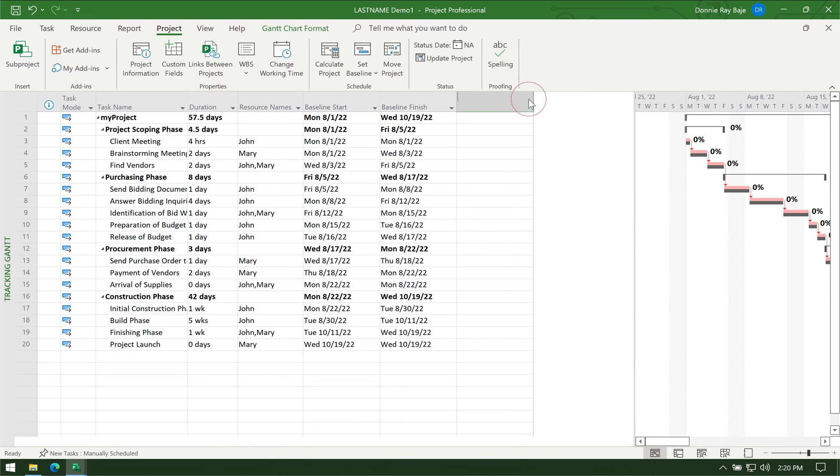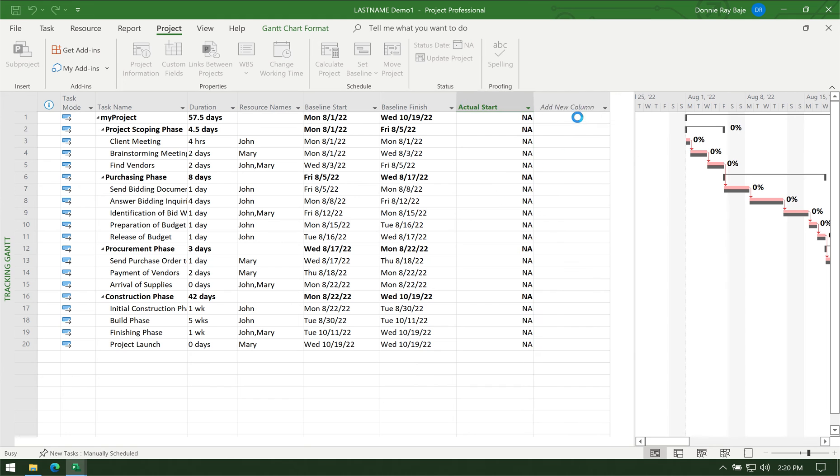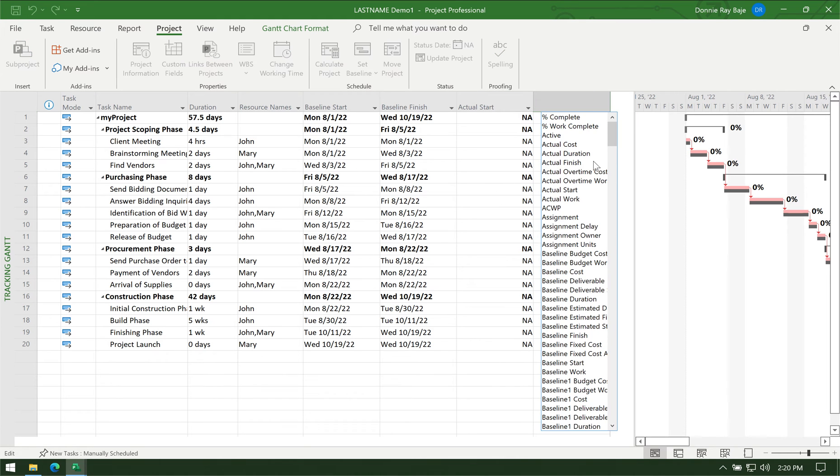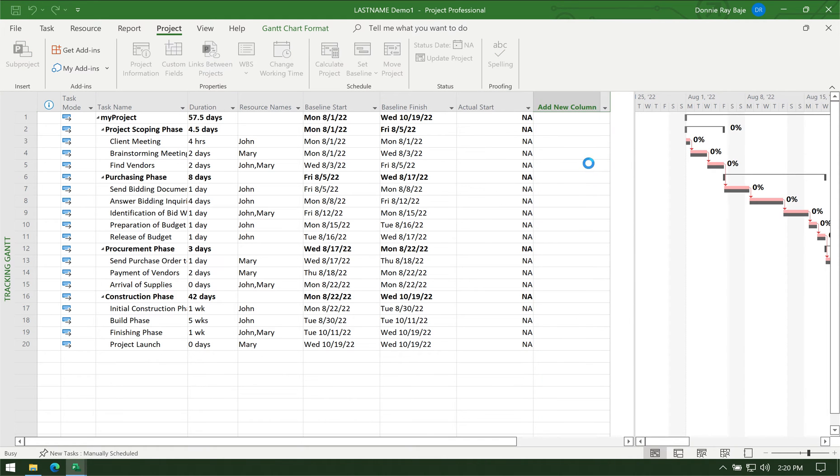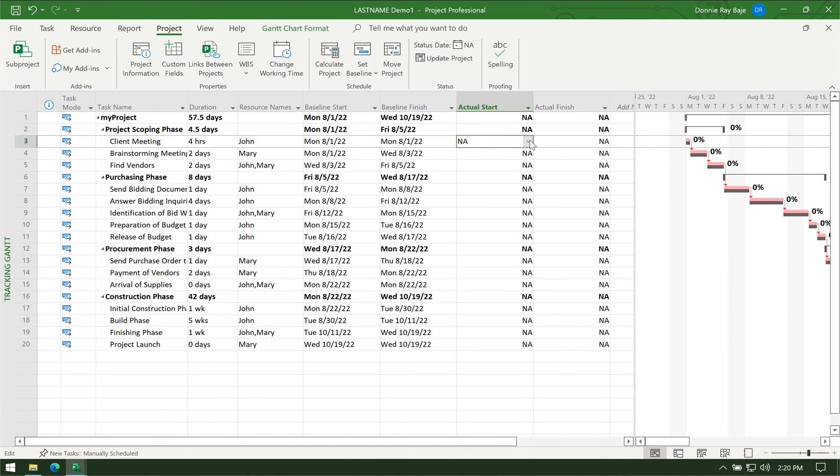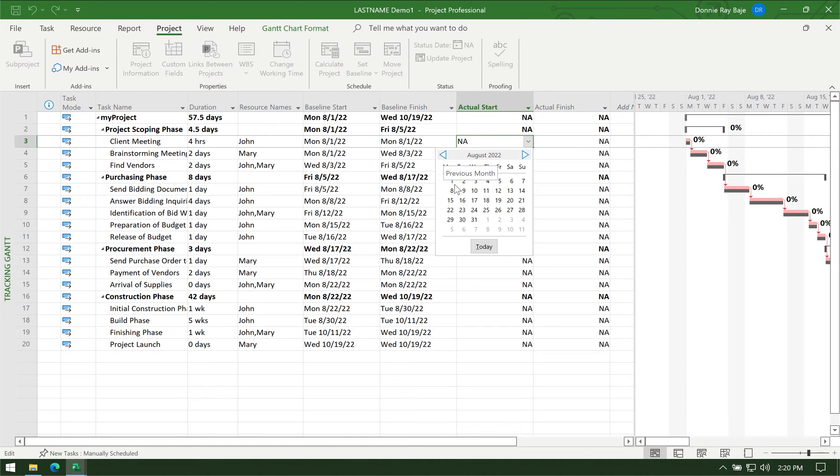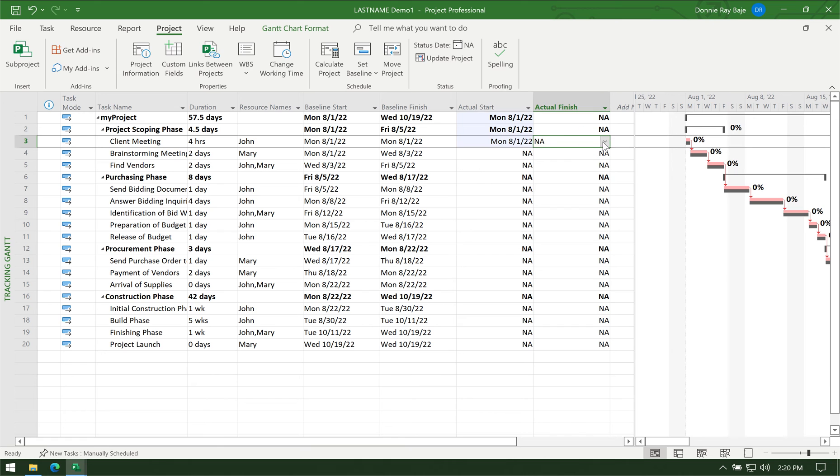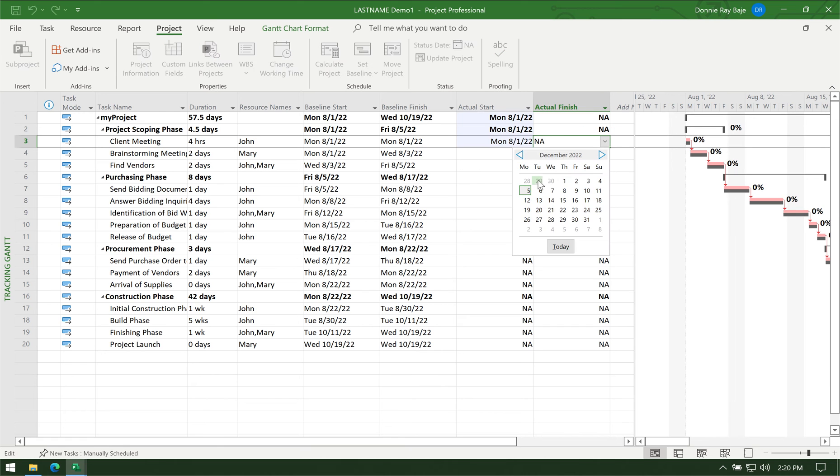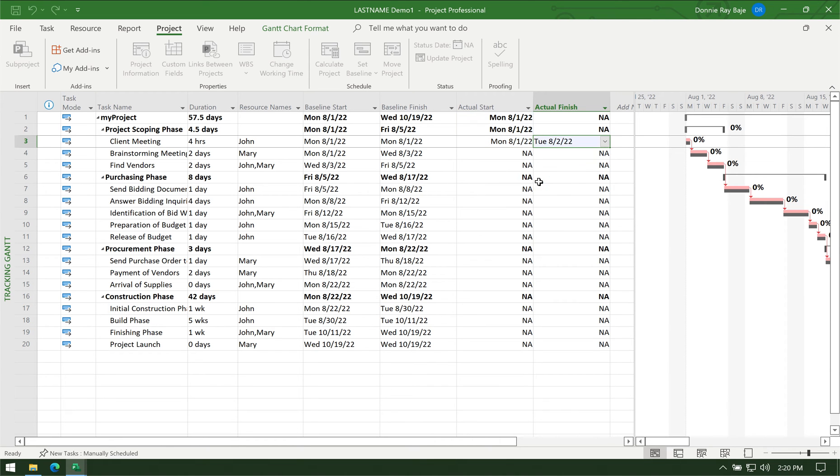The next part is you have to accomplish the actual start and the actual finish, which as you could see doesn't have anything yet. You have to fill out when the project really started or when the task really started, together with when it actually ended. If you have been doing this, good for you—you don't have to manually do it one by one. But if you haven't, then you have to fill out everything.